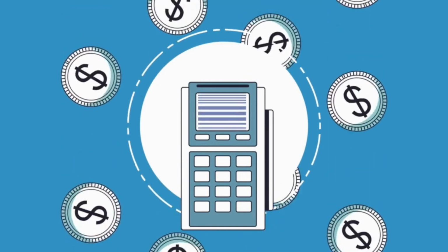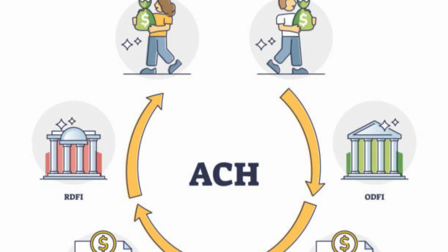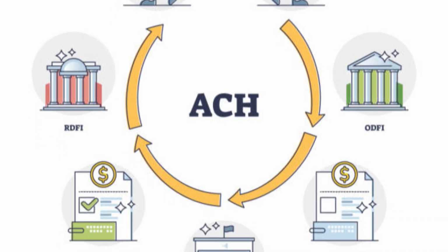Second, we also make sure our clients are billing their customers and allowing for electronic payments, not paper checks. Even when they create the initial construction contract with their clients, we advise them to attach an ACH authorization. So there is an ACH authorization from your client on file, and whenever the progress payment is approved, you are able to draw automatically from their bank account. This makes the invoice-to-pay cycle much faster.